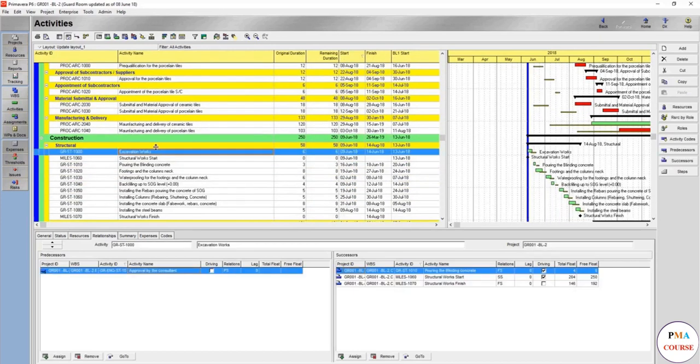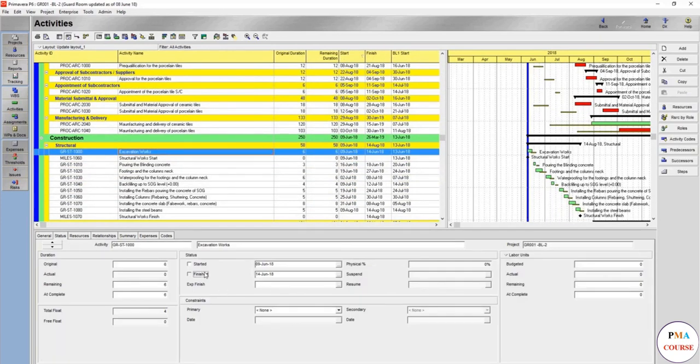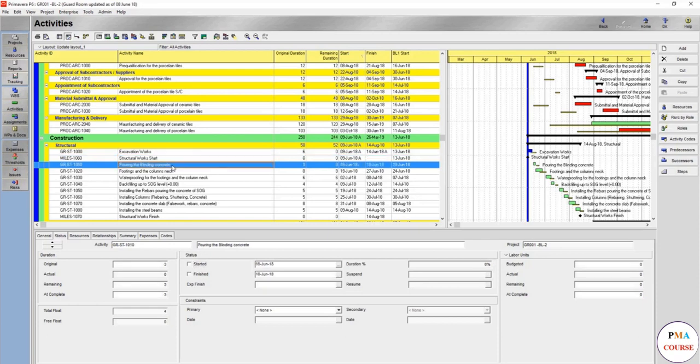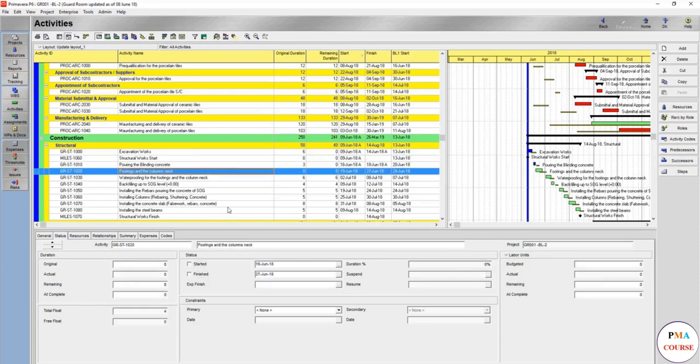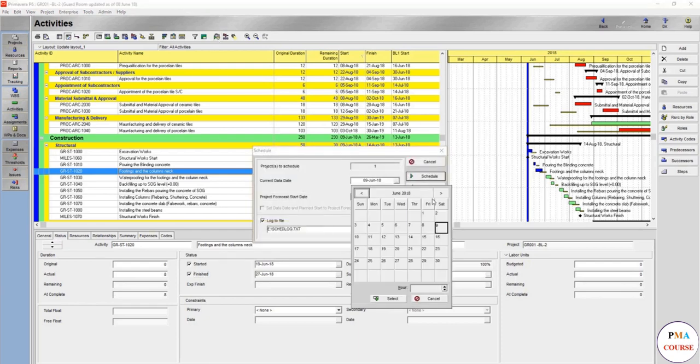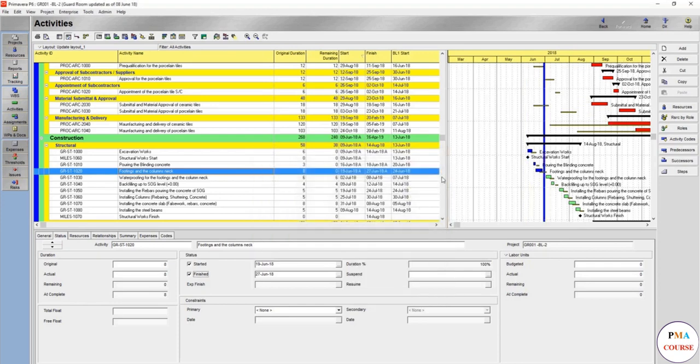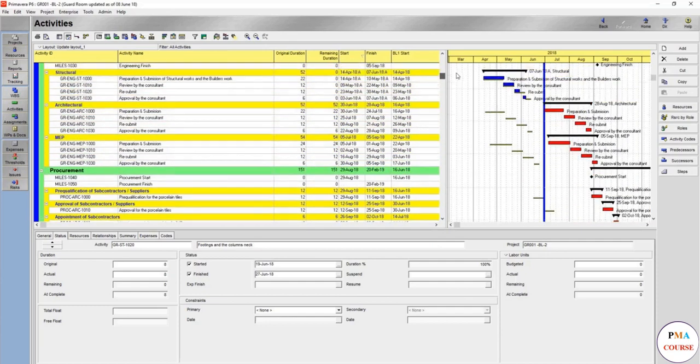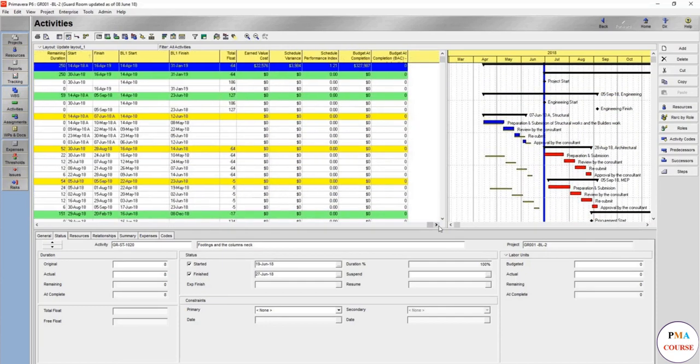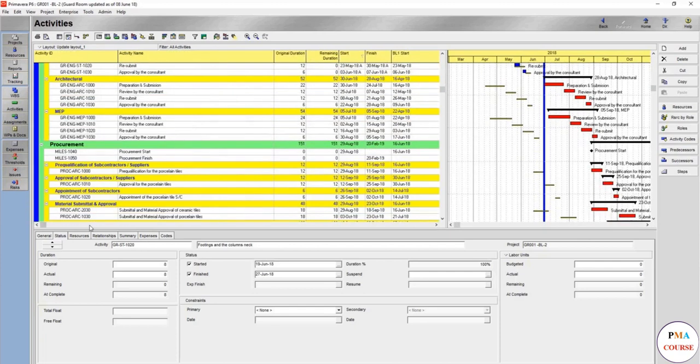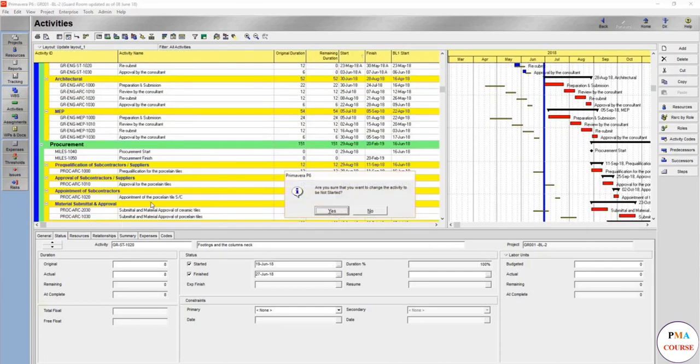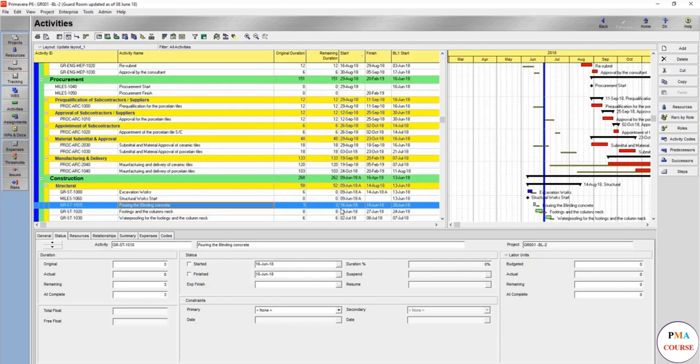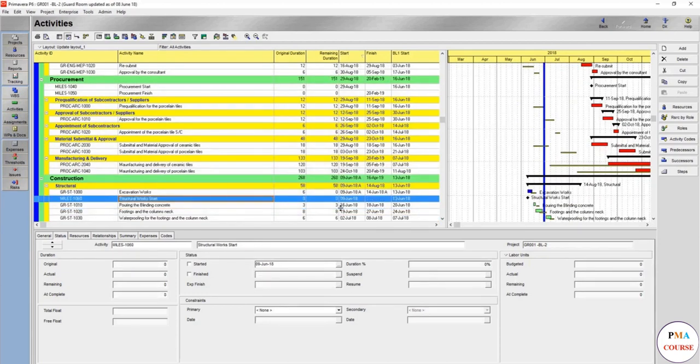Let's now re-update. Let's say excavation works, we'll assume it's started and finished. Structure works for sure started and bring plenty concrete started and finished. We are assuming that we are going to run on a different date, say 30 June to see for the sake of an example. The earned value cost will be updated here so you know that you have done work equivalent by 22,576. You can just undo each and everything and run again to 9 June.